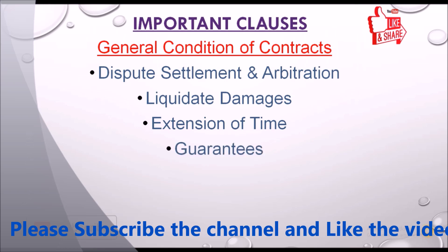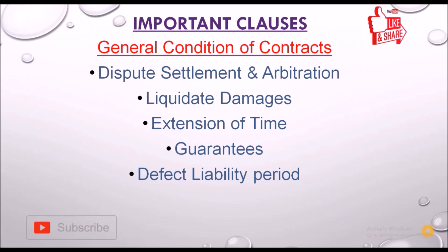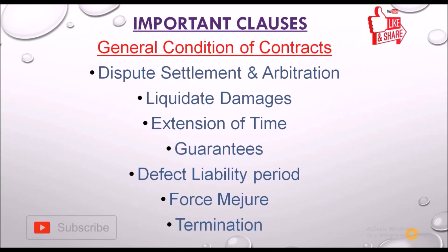Guarantees of work — whatever work is executed by the contractor, a guarantee is given for the defect liability period. The retention or security money is withheld with the client and released after the defect liability period. Force majeure covers conditions where delay is not considered the contractor's fault, such as war between countries or an earthquake. Termination defines the conditions under which the contract can be terminated by the client or the contractor.